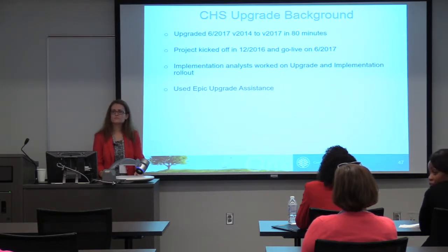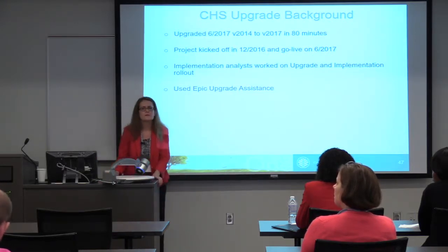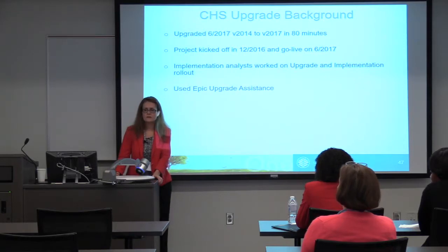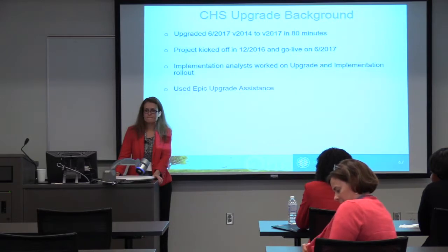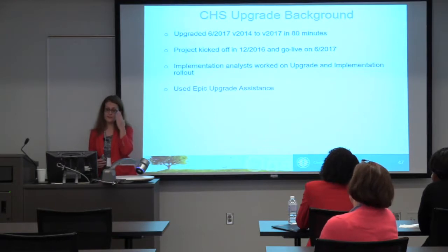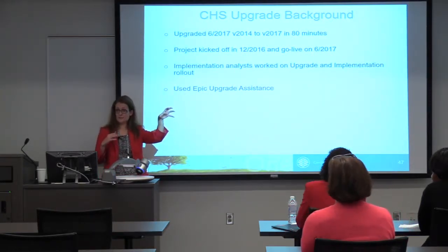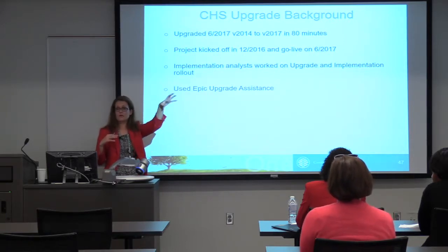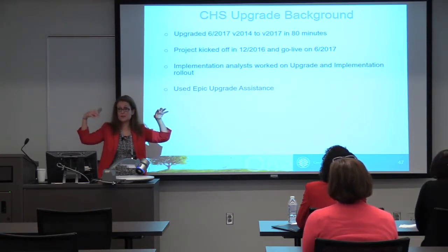And I would assume that Epic has a way of you keeping your upgrades separate and reapplicable to the next release like you're doing here with the upgrade. Do what now? When Epic comes in with an upgrade, you have a way of managing your updates, reapplying them back in? Oh yeah, so I'll give you the example that we had. We had to have a separate test environment, for example, of where the upgrade was, and we were testing there, but we still had go lives going on that we needed to fix production for.